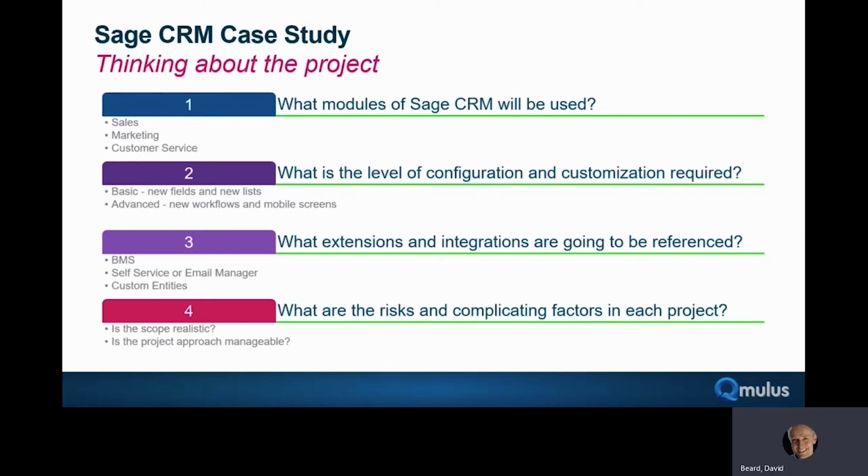And think too, if you look at the number 2 on the screen, this idea about focusing as much on delivering the value, delivering the thing using configuration of the product wherever possible, that metadata conversation I had earlier, versus customization. It's faster, safer, and easy to unpick if you want to change things. Customization, potentially writing code, takes longer to do, takes longer to roll back. So think hard about configuration first for ease of use, ease of deployment, cost, and a whole lot more.